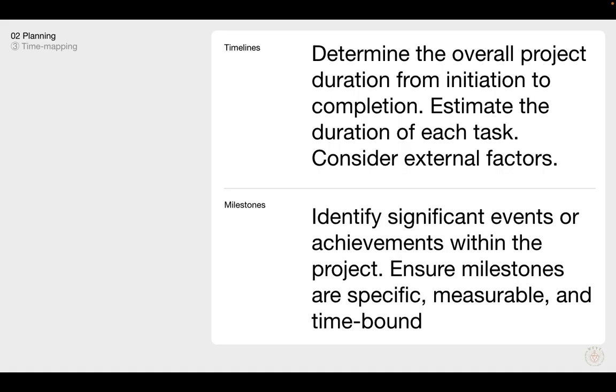So say, for example, you have a certain task that needs to get done, but then you've accounted for someone's availability and you realize that they're actually on holiday during the time that this task needs to get done. Because you're still allocating during this mapping stage or the planning stage, you can push that task to happen a little earlier so that they can complete it before they go on holiday.